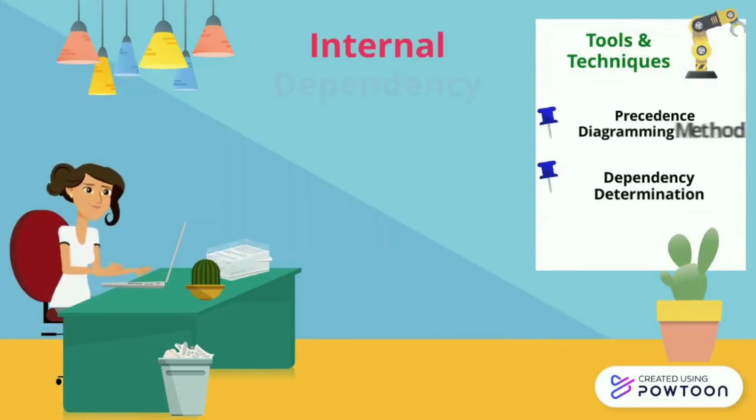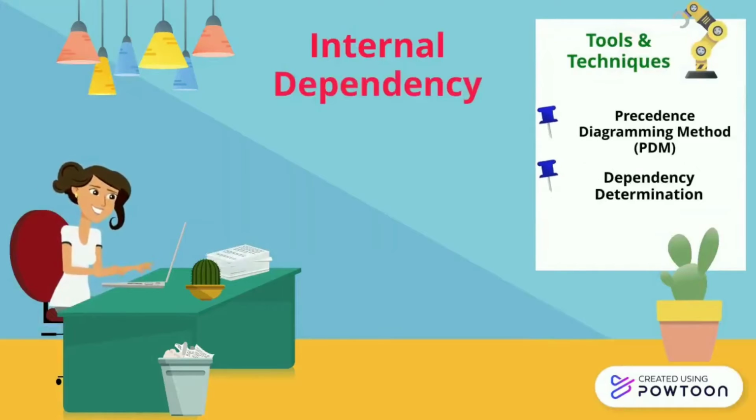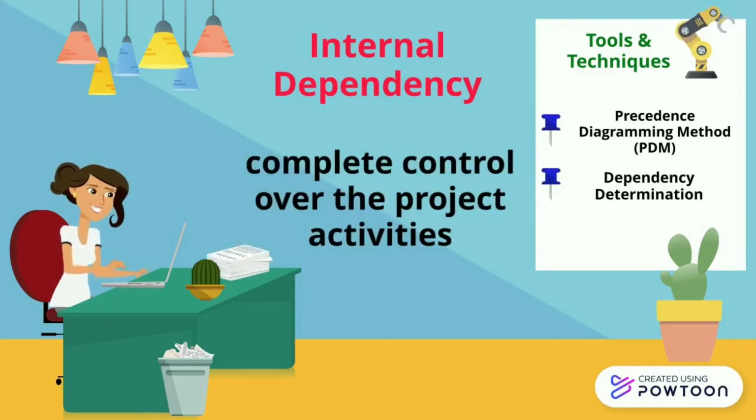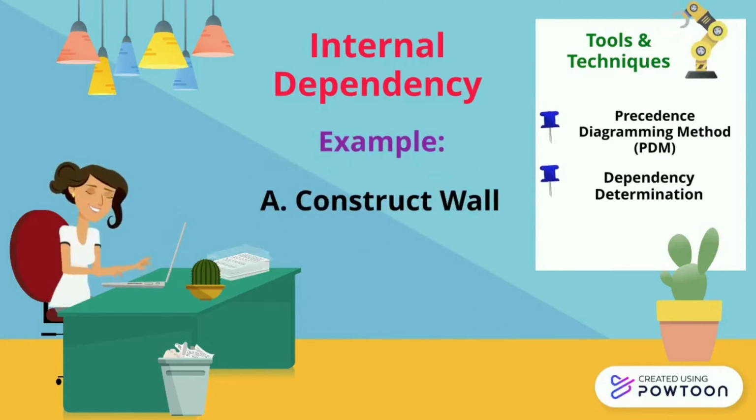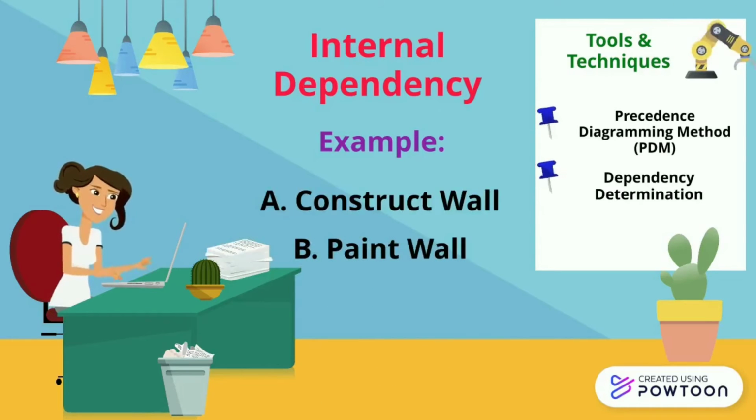And lastly is the internal dependency. Internal dependencies are defined between two project activities. Generally, the project team has complete control over the project activities. There is no involvement of any external party. For example, constructing a wall and painting a wall.